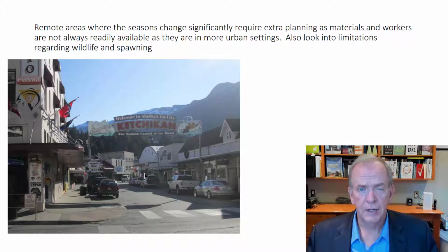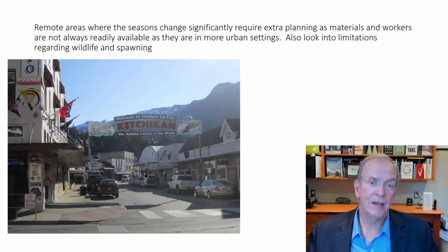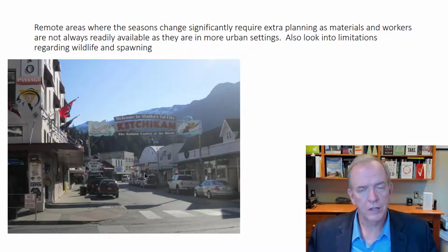If you miss something, you might have to fly it in, but it's probably too heavy or too big or too costly to do that, or you have to wait. So it's not just running out to the store and grabbing something. So that's some of the advantages that in a large urban center you can get a lot of things. Not specialty fabricated things; those things take time. But off the shelf type things you can generally get. But you get into remote areas, you can't make those assumptions.